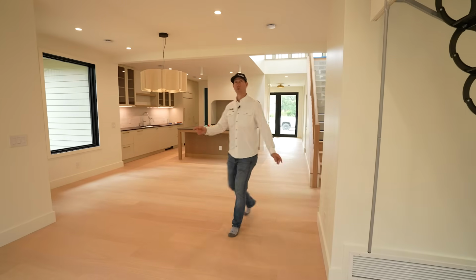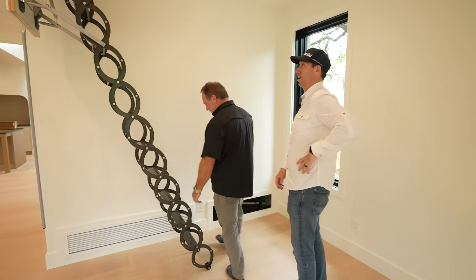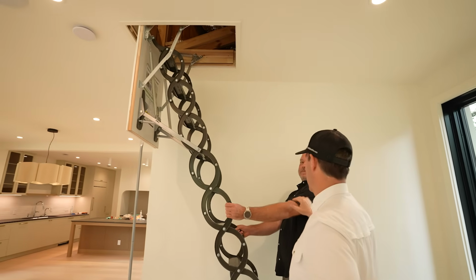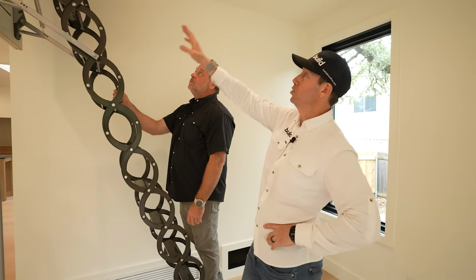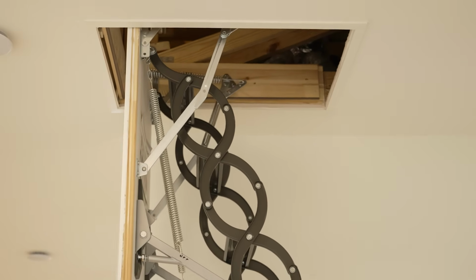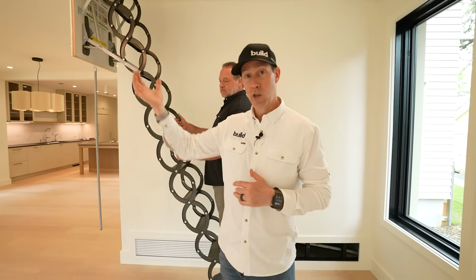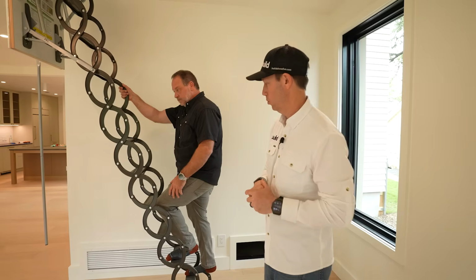Cool. So Lee, all your equipment is up above us here in the living room attic, but as you shimmy your way up there, I want to admit to a mistake I made. I used this beautiful Facro ladder, which is an awesome ladder, but I didn't size it correctly because you and I can get up there, although we need a little acrobatics. A year ago, I couldn't have got up there. You're looking good, brother. But if I have to change equipment out, I would not make it up there with the equipment. And during the framing stage, I actually knocked out the framing so I can make this access bigger. We're gonna turn this piece of drywall right here into a removable 3/4 panel so it can get bigger, because when I need to replace my dehumidifier or my ERV that's up in the attic, it wouldn't make it through that hole. So that's something that I messed up on ordering this ladder size at the beginning.